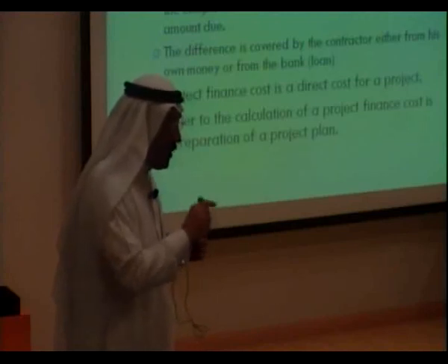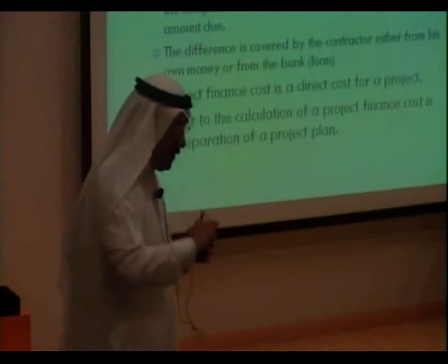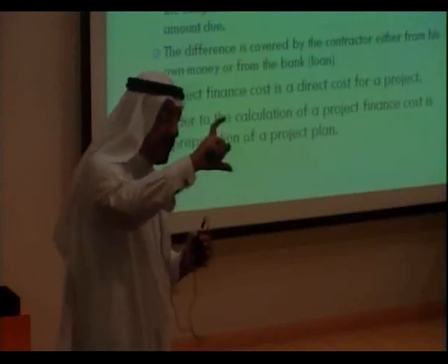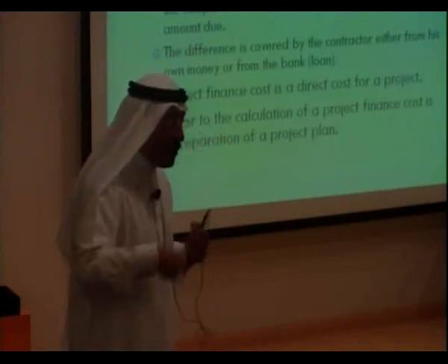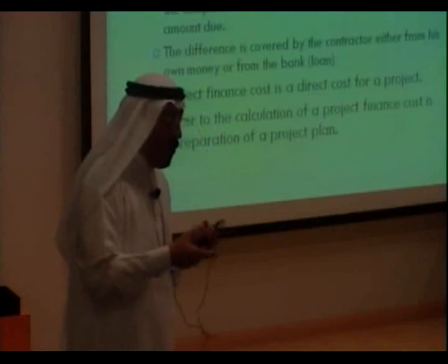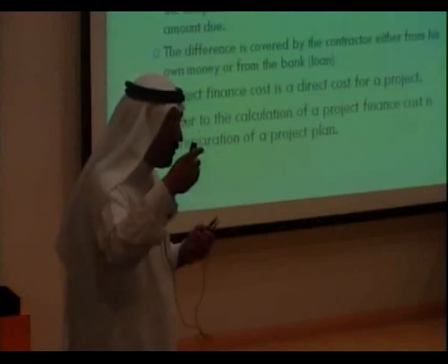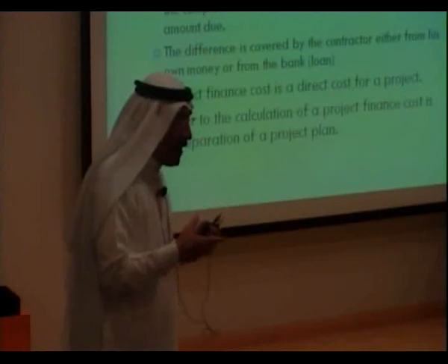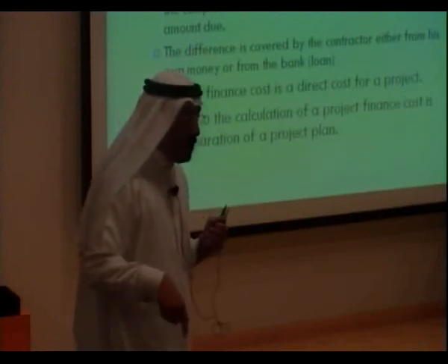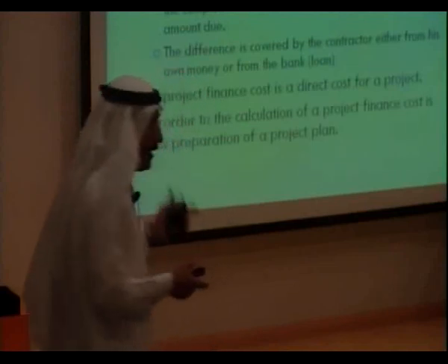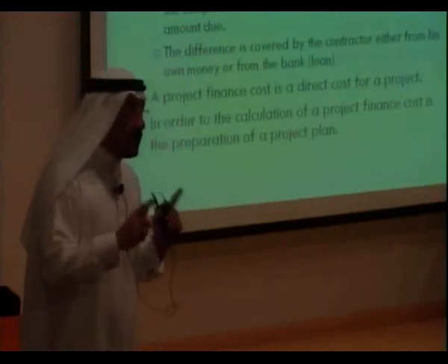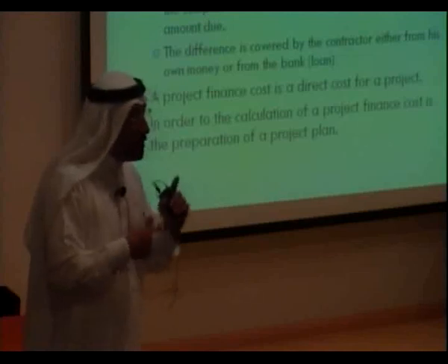Then you will have an overdraft. At the end, you would need more money. And this more money that you would need, either you pay it from your pocket as a contractor, or you are going to borrow it from a bank. If you borrow it from a bank, or you use your own money, then there is a charge for it. Either way, in order to see what is the proper cost for it, you have to see what is the amount of money that you need.